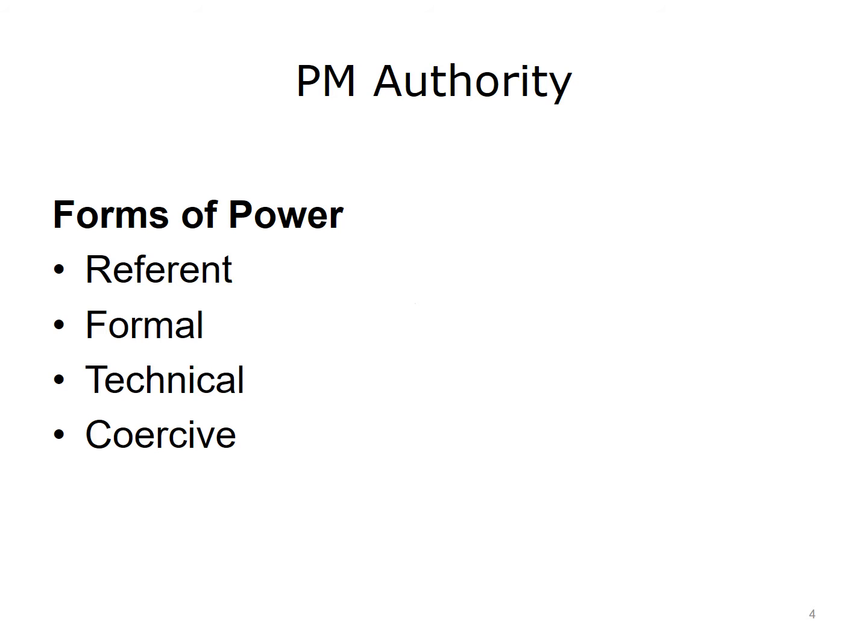When managing a project team, it is important to understand the different types of authority that exist. The team dynamics will be greatly impacted by how power is asserted within the team. Referent power is individual power based on a high level of identification with, admiration of, or respect for the power holder. Formal power is based on rank or position – where the project manager has been assigned by senior management to be in charge. Technical power is based on strong technical skills in the project's domain. Coercive power is authority dependent on fear, suppression of free will, and/or use of punishments or threats.